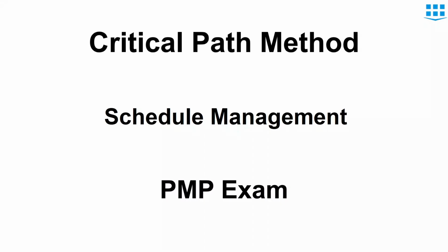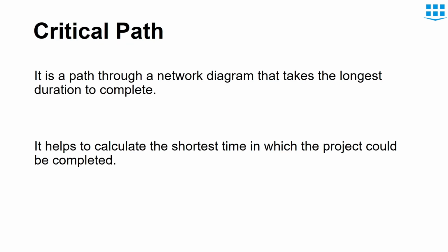Everyone. Today we are going to discuss critical path method, another important topic of PMP exam. This topic is important in scheduling of the projects. So what is a critical path? It is a path through a network diagram that takes the longest duration to complete. It helps to calculate the shortest time in which the project could be completed.